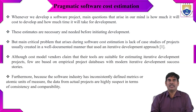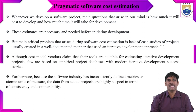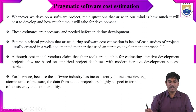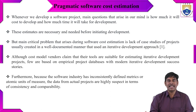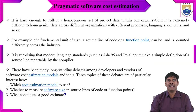The software industry has inconsistently defined metrics as atomic units of measure. Data from actual software projects are highly suspect in terms of consistency and comparability. Organizations need to define metrics or units to measure software projects for consistency and compatibility across various domains. It is very hard to collect a homogeneous set of project data within one organization, and extremely difficult across different organizations with different processes, languages, and domains.